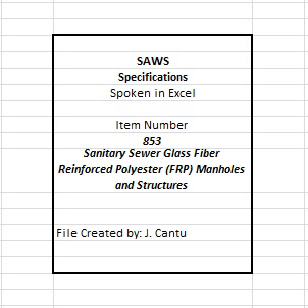853.7 Payment. Fiberglass reinforced plastic manholes and structures will be measured as each structure complete in place. The work, as prescribed by this item, will be paid for at a lump sum unit price bid per each fiberglass reinforced plastic manhole and structure. Sanitary sewer manholes and structures shall be paid at the contract lump sum unit price bid for each such structure. Percentages for completion shall be as outlined below and will be based on the completion of the following